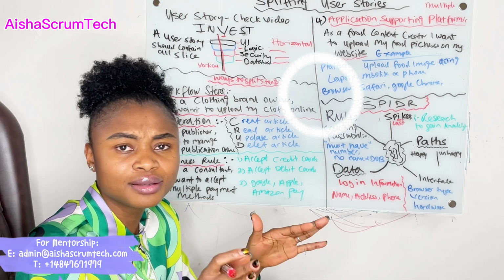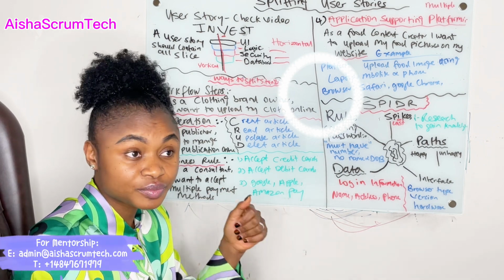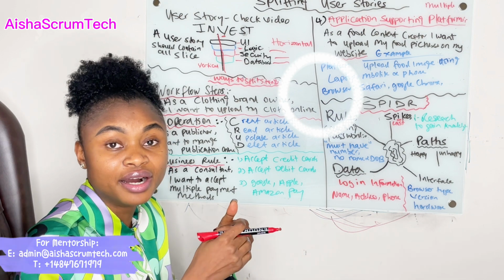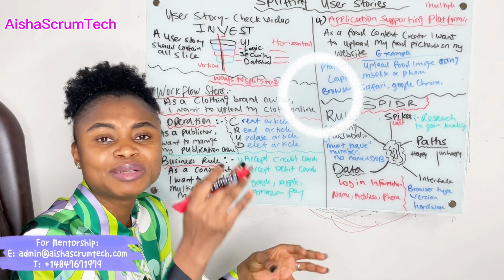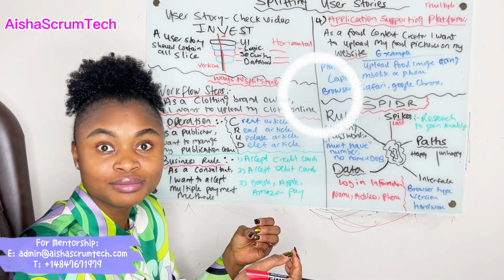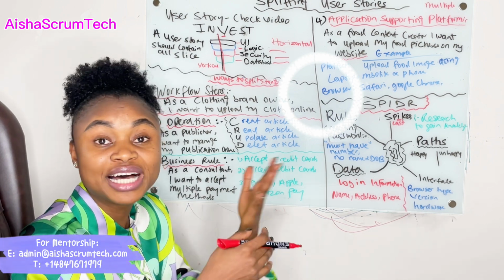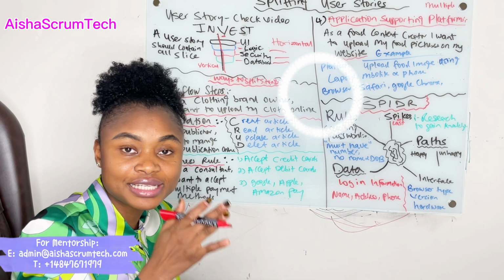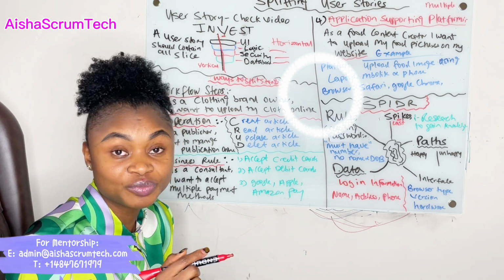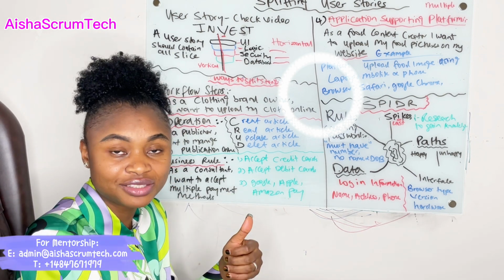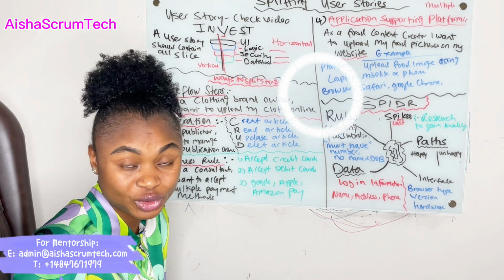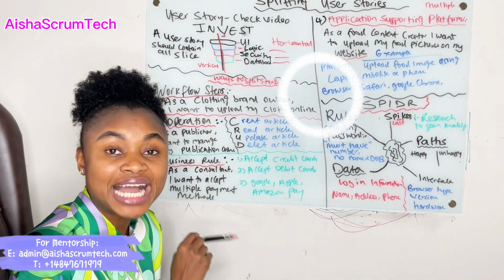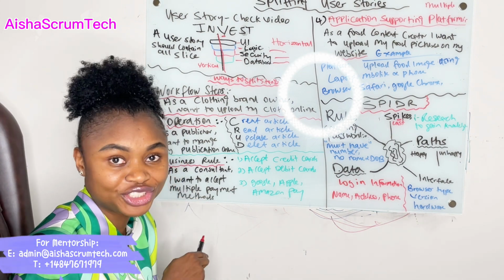So instead of having a user story on your backlog as an end customer, I would like to upload a cloth, instead, you can focus this sprint on creating login access. Next sprint, the customer will be able to upload their picture. Next sprint, the customer will be able to add a description. So break down the workflow sprint to sprint, instead of just having that big one to upload the whole picture on a website. So that's one example.